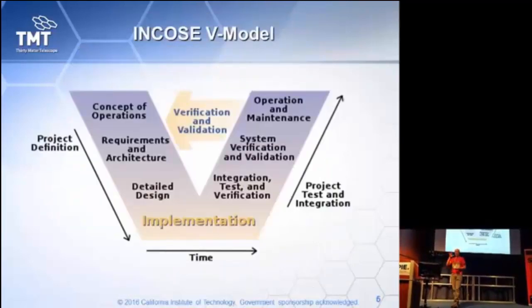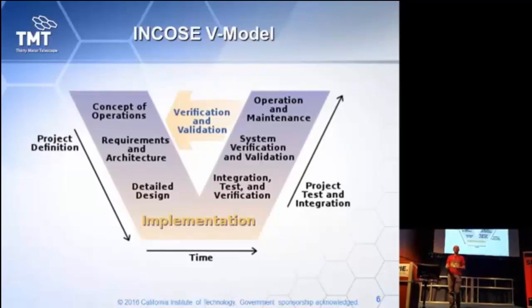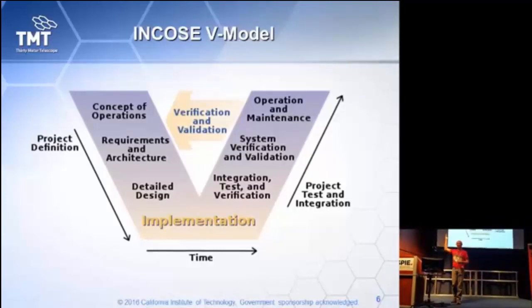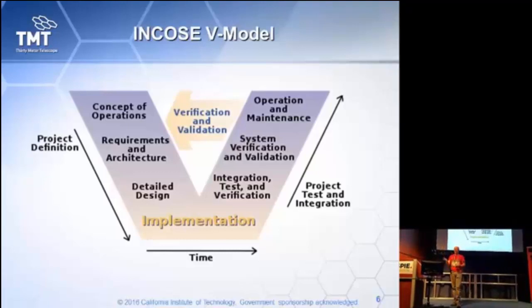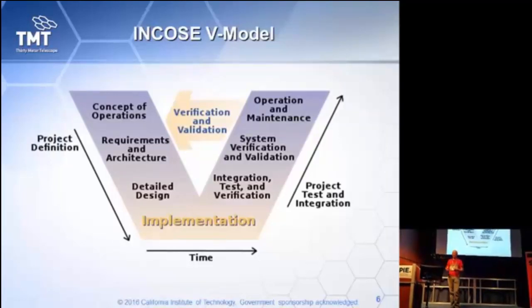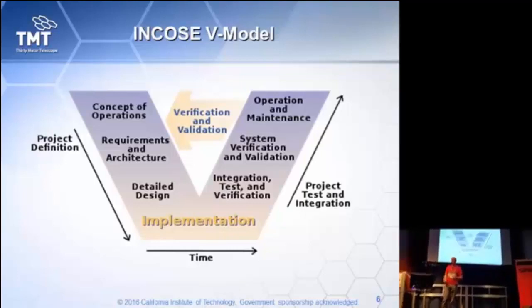If you look at the traditional V model of engineering, you have all the definition on the left leg and the verification on the right leg. And this model typically implies some waterfall, which is one problem, so there is no iteration. The other problem is that the verification, at least in the traditional approach, happens only on the right leg. There's not much verification on the left one.